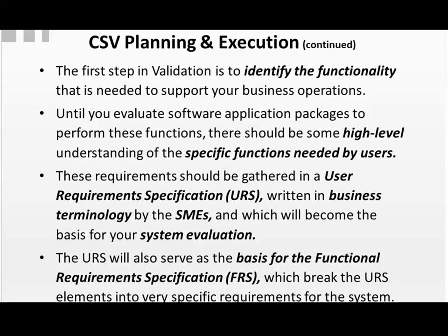And until you evaluate different packages to perform the functions that are needed, you need to have that high-level standard. You need to know exactly what the user is looking for. The requirements should be gathered in the user requirement specification, the URS. That should be written in business terminology by the subject matter experts and should be the basis for evaluating different packaged software. The URS will also serve as the basis for developing detailed functional requirements. Your FRS should break up the URS elements into very specific requirements for the user.